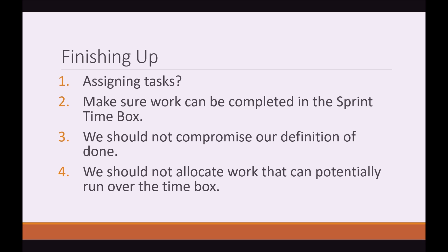Assigning tasks: once we've gathered a full list of our Sprint Tasks and Sprint Backlog items, in Agile we do not pre-assign tasks to each team member. Instead, we create this list, and once we start the Sprint, developers can pick out the tasks they feel they would work on. Once they complete a task, they'll just pick out a new one from the board.